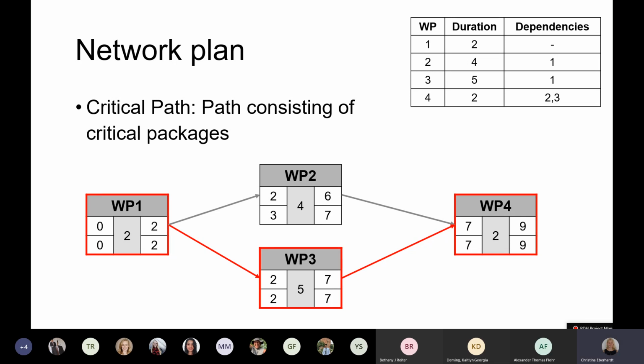One strategy would be to assign employees differently from the start and therefore change the times that a certain module takes. Another option is to add different work packages that are pretty much like miscellaneous bug fixing and put those buffer times in and therefore push the final deadline backward further.